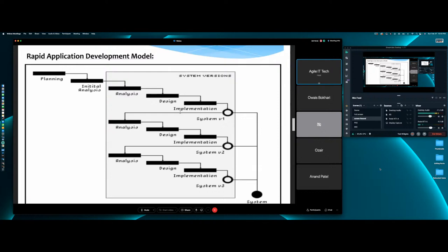So which is the most critical team? Team two. Then team two will integrate with which team first? Team one. You're going to drop the engine and the transmission in before you drop the interior and the exterior, right? Yes, correct. So if there is any slack in delivery delay, which team is that? Team three. One and two will start integrating on schedule, right?